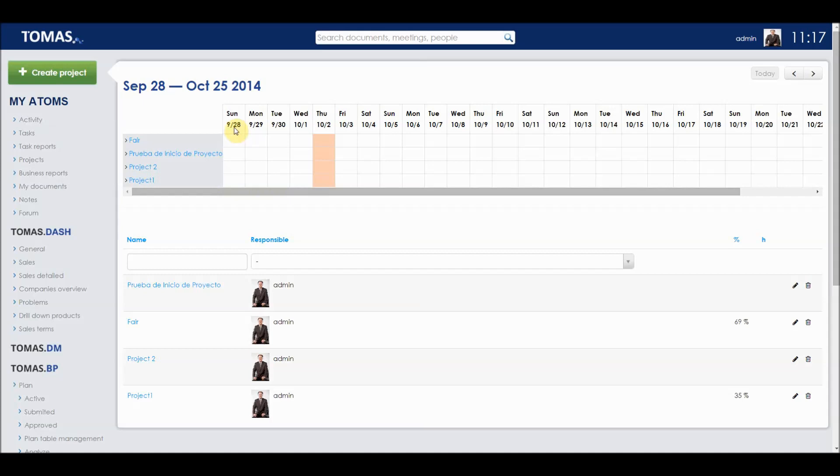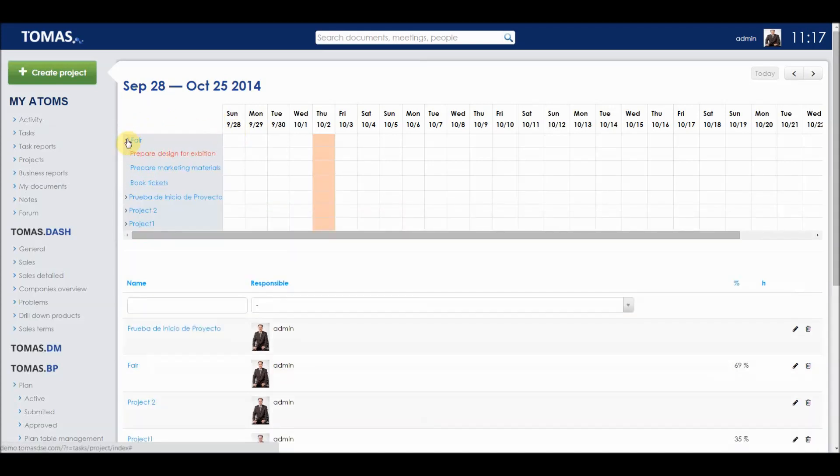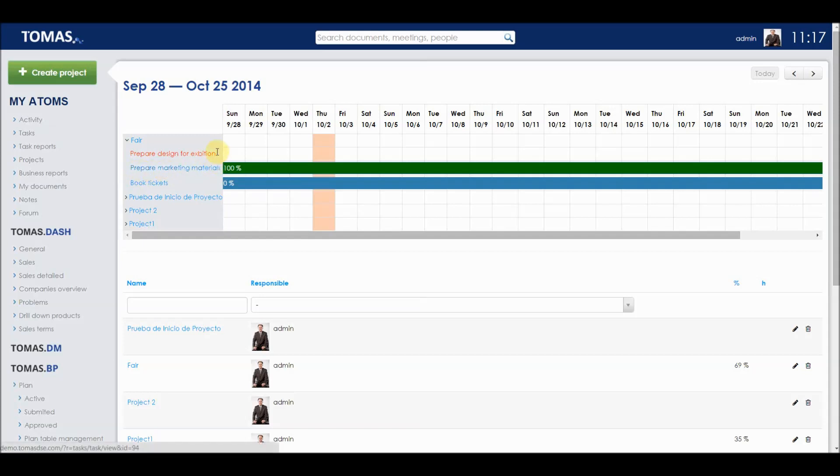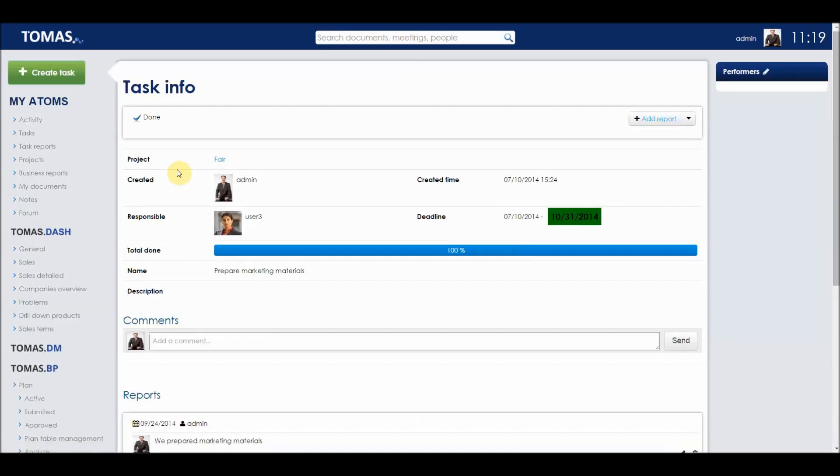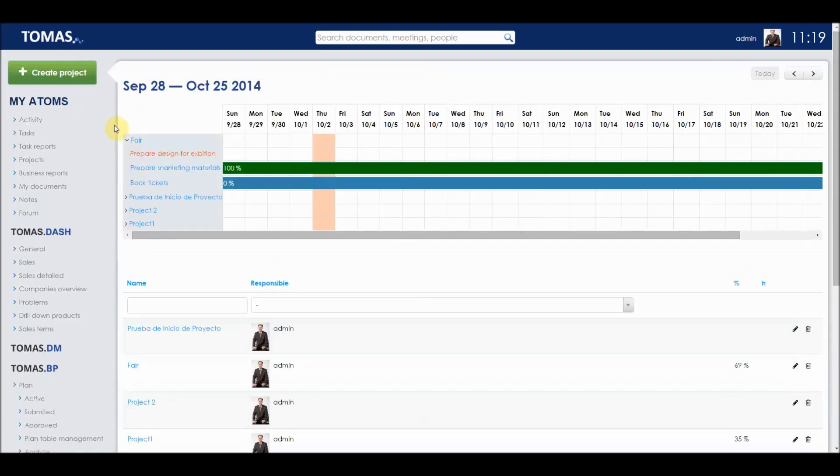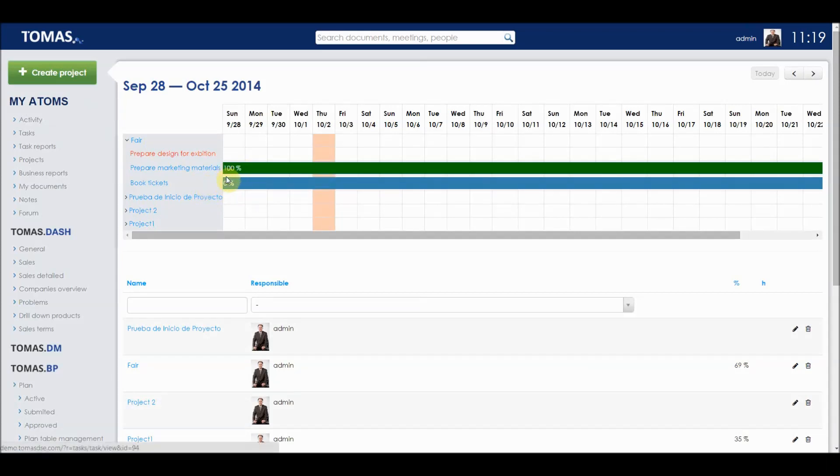Responsible and other members of the project group also get an email when a report is submitted. In the Projects section in My Atoms, we can see different projects, for example, Fair, where we can see different tasks associated with the project. We see which tasks are running on time or are finished with the blue color, and which tasks are being late, for example, the task to prepare design for exhibition. We click on Prepare Marketing Materials. We can see responsible for these tasks, the deadline, and percent of completion. We can also add a report for the tasks associated with each project. The percentage realization of the whole project is calculated from the percentage of realization of the tasks associated with the project.